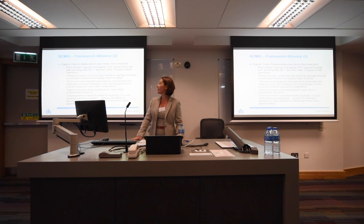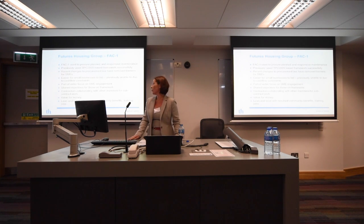And you can look at this case study, and the case study demonstrates the post-tender savings averaging 14%, agreed through that joint working with the Tier 1 and the Tier 2 and 3 supply chain members. And just some quotes there from the case study. Reduced risks, cost savings and time savings through accelerated constructor supply chain briefing, subcontractor supplier innovations in proposed new materials and specifications and exchange of best practice between specialist competitors, improved repair and maintenance and more sustainable solutions, development of opportunities for local Tier 2 and 3 subcontractors and suppliers, and that's across 30 different disciplines, and additional employment and skills opportunities. So you can really see there the benefits of that framework alliance between the two entities and how that's achieved savings and efficiencies.